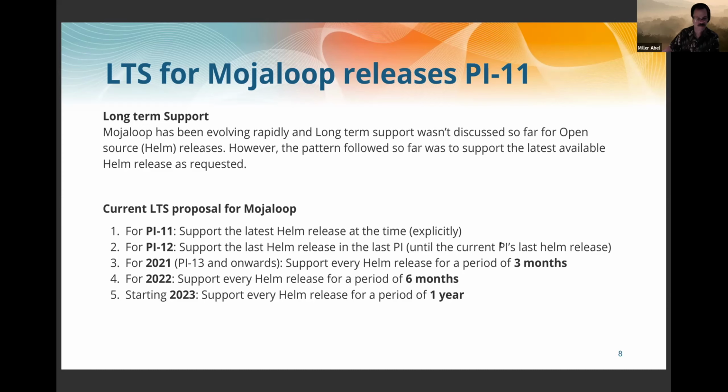Yeah. And just one final point, which is that what you mean here is the LTS support. There will be other Helm releases in between the LTS, but they're not necessarily being offered as LTS supported releases. So as new materials become available to implementers, they can be tested in test environments. And the recommendation would be that they are not yet LTS verified, but that they are available. So that the stream of available releases doesn't necessarily cut down, but the support for particular releases will be uneven.